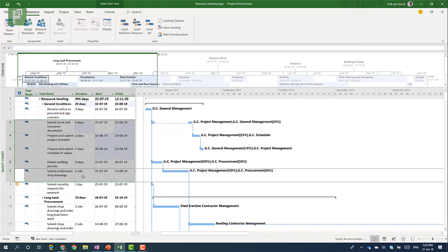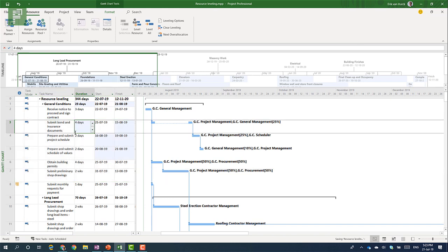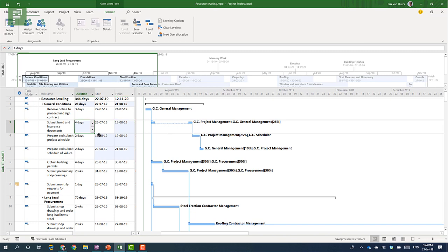As soon as we add the bottom two over allocations something else happens. The over allocations disappear and one of the tasks skips a whole wide range into the future. The duration is still four because this is work days. But the end date of that task has been postponed radically. Now right from the start that might not be the solution that you're looking for but this is what resource leveling does out of the box for that specific task set.